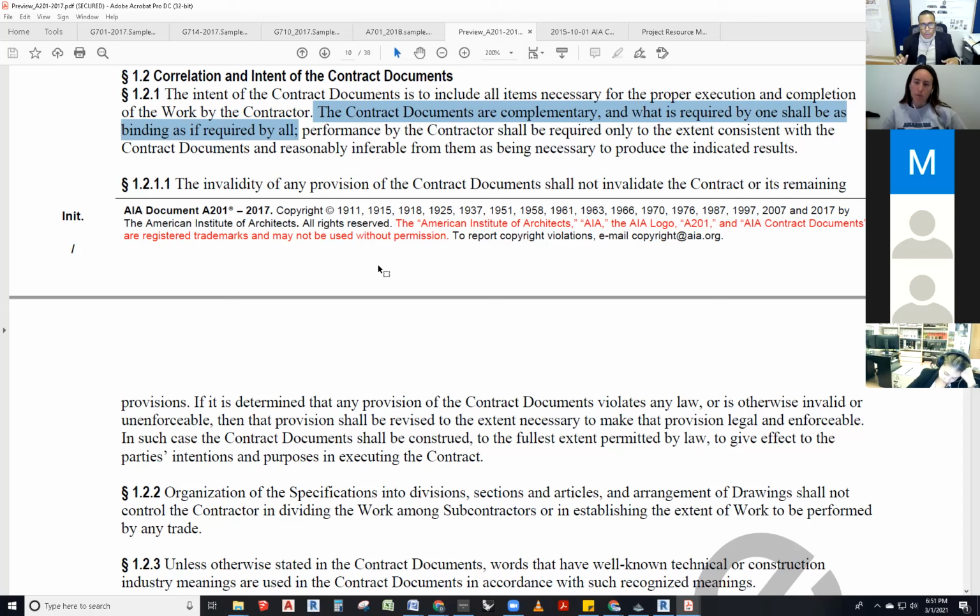Request for information, RFI number 1, RFI number 2, RFI number 3. You know what? When in doubt, just ask. If they were to know about it and omit it, they become liable for it. Isn't it funny? Because you saw something, you didn't say anything about it, and you knew about it. That moment, you own it at that point.